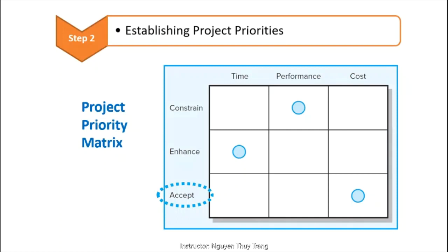This figure displays the priority matrix for the development of a new wireless router. Because time to market is important to sales, the project manager is instructed to take advantage of every opportunity to reduce completion time. In doing so, going over budget is acceptable, though not desirable. At the same time, the original performance specifications for the modem, as well as reliability standards, cannot be compromised.